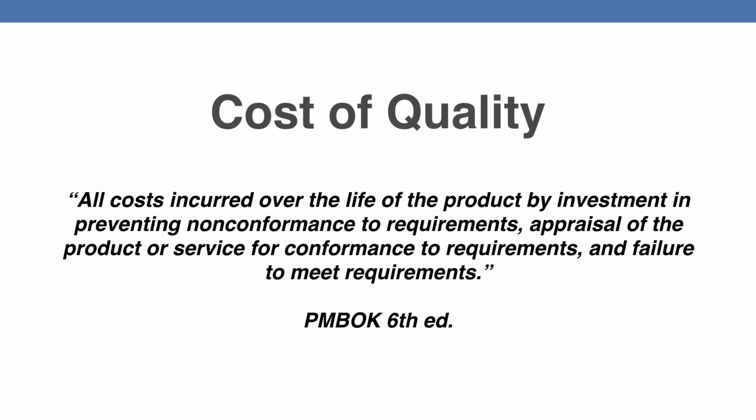Cost of quality is including all of the cost of conformance plus all of the cost of non-conformance together to give you the total cost of quality. So cost of conformance includes all of your costs to eliminate errors from the end product, such as testing or inspection, and cost of non-conformance includes costs such as bad reputation or warranty cost.